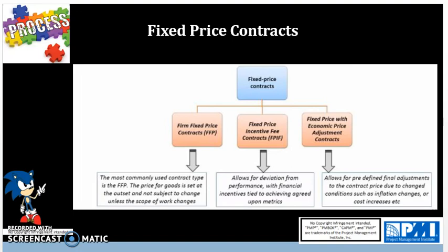For example, you might have a contract for $1.1 million, and for every month early the project is finished, an additional $10,000 is paid to the seller. So the faster you can do it, you get $10,000 more for the seller, so they have an incentive to complete faster.